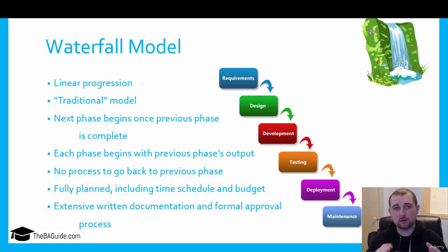As you get done with requirements, before you go into design, there's a formal requirements approval by the business users or the stakeholders and the project sponsor. Once it's through design, there's a formal approval. So you use them as toll gates or stage gates, if you will, that you can't move on to the next phase until it's been approved. That's definitely very helpful.